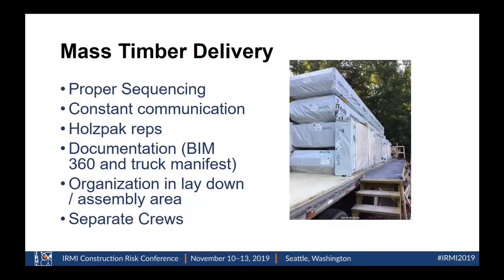But working with the cross-laminated timber manufacturer out of Austria, we had to come up with a good sequence, constant communication. We had truck drivers that actually started out on the East Coast, coming in through Savannah, Georgia, and the trucks would show up out of sequence. We wouldn't get what we needed. We were supposed to have this truck on this day. We'd get it on day 4. We'd get the day 4 truck on day 1.